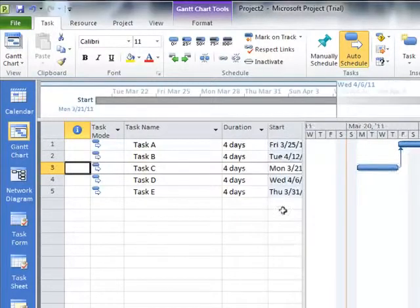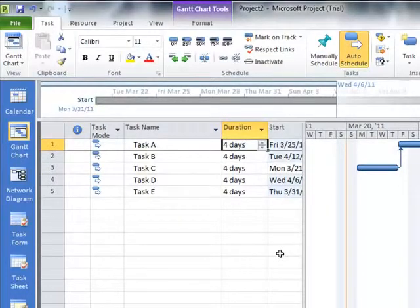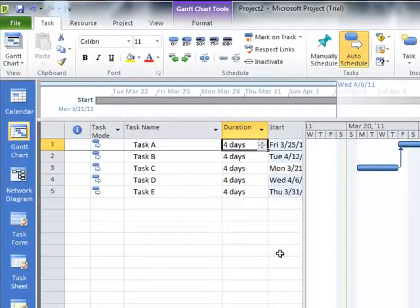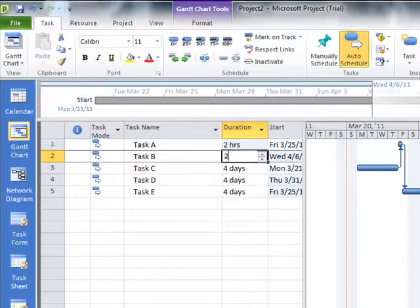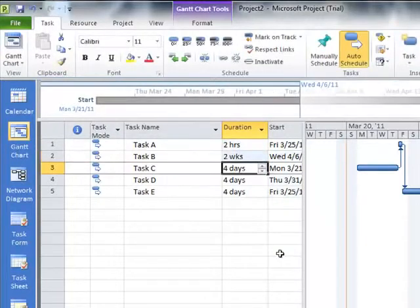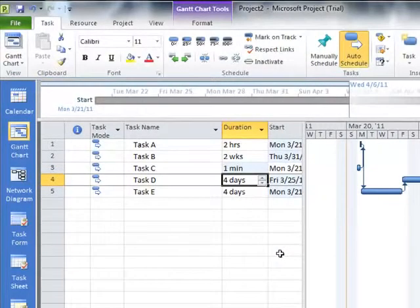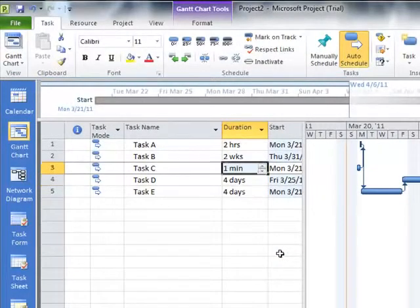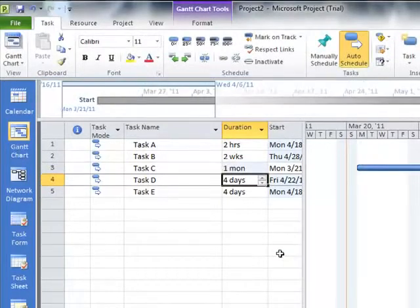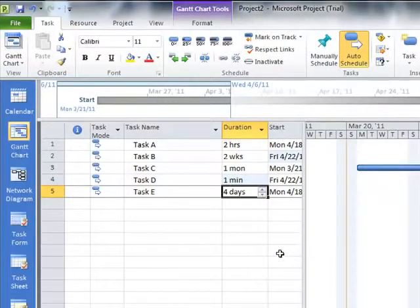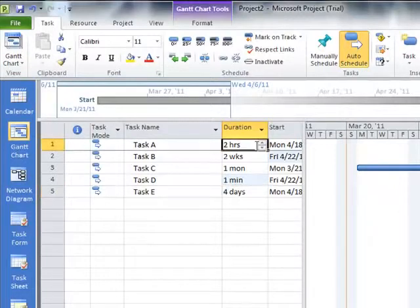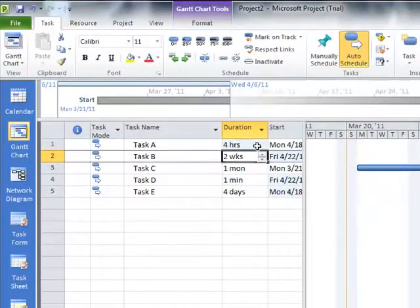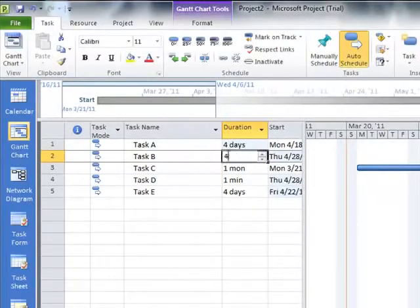Let's look at this duration aspect of our tasks. We have, by default, days as the period of time that we measure. We can do this in hours - 2H will give us hours. We can do it in weeks - 2W will give us weeks. We can also do it in months - 1MON will give us a month. 1MIN will give us minutes. I can't imagine any tasks where I actually want to schedule in minutes, but apparently it's possible.